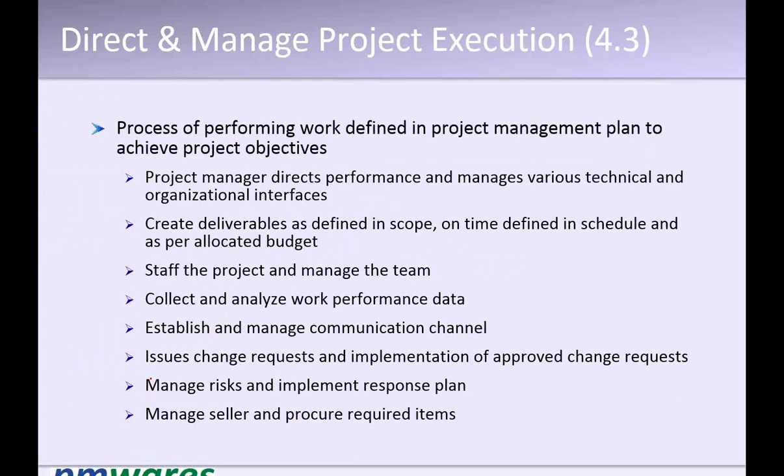Besides this, another important thing is, because we talk about controlling quality and checking the variance, for checking the variance we need two things. One is the plan and the other is the performance data, the execution data. So collect the data so that in monitoring and control we can compare and identify preventive and corrective action measures. Collecting the data is very important. When the deliverables are being produced, we need to collect data on how they are being produced so that we can compare it with the plan in monitoring and control.